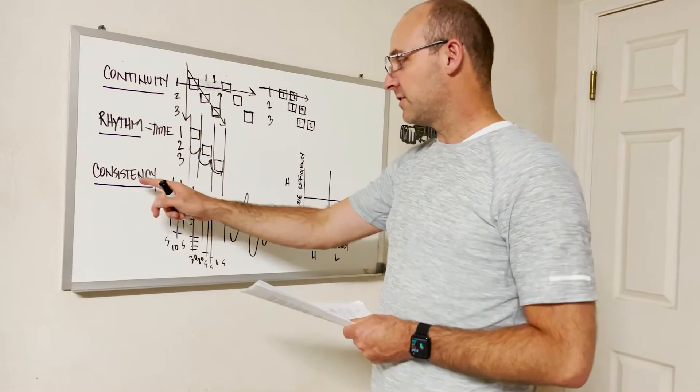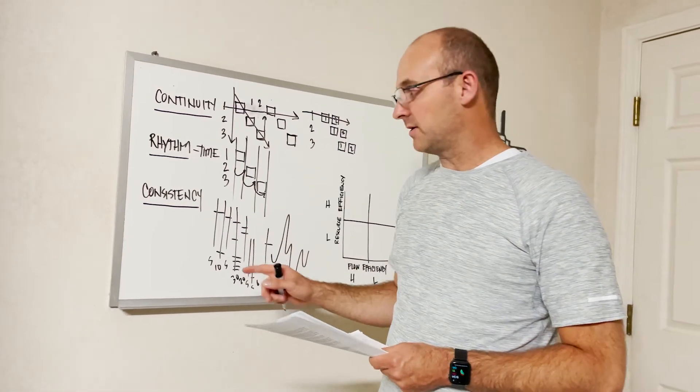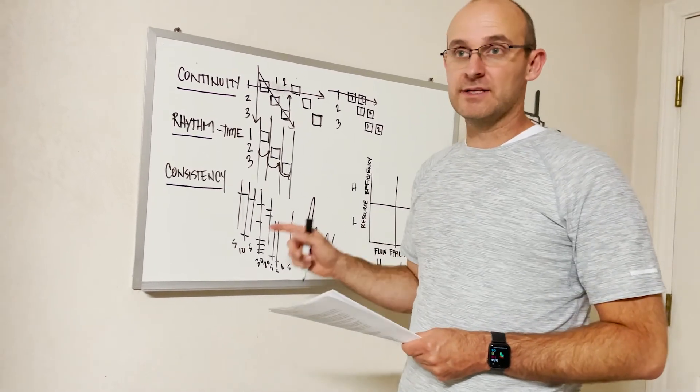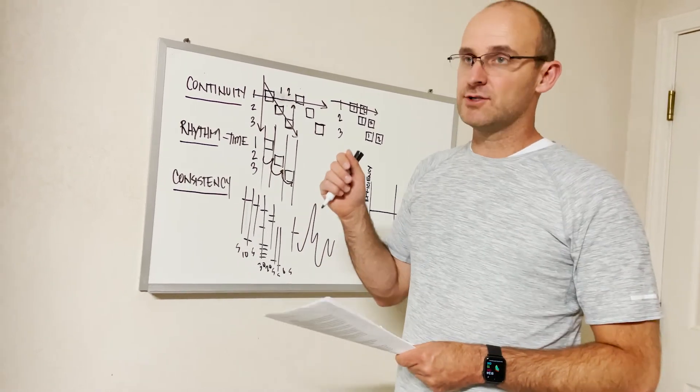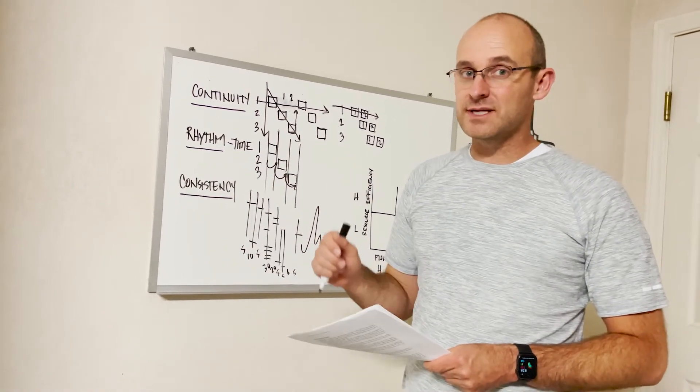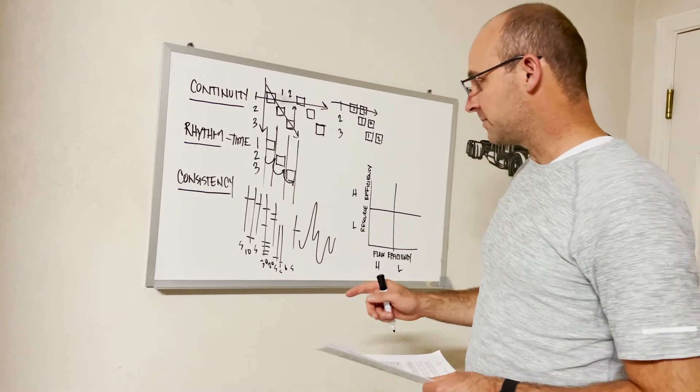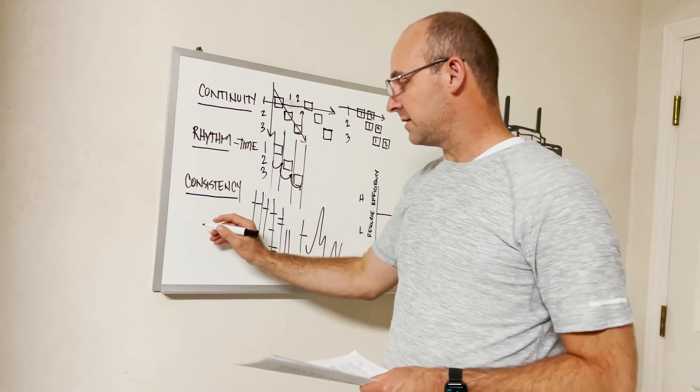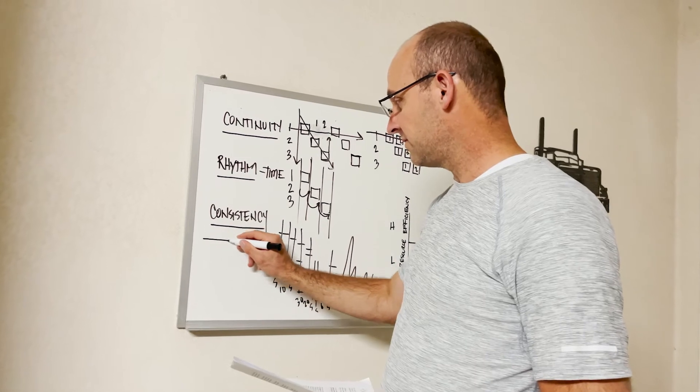And when you have a fluctuation in manpower or crew counts rather, in materials, then that expends money and it slows production because of context switching, because you're onboarding new people and the complexity of communication increases. So we have to have consistency. And when you do tact planning, let me just draw it down here.